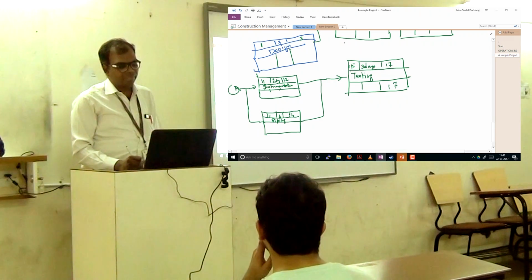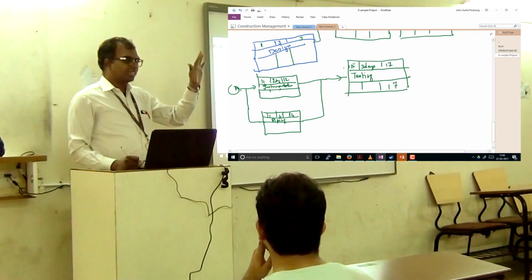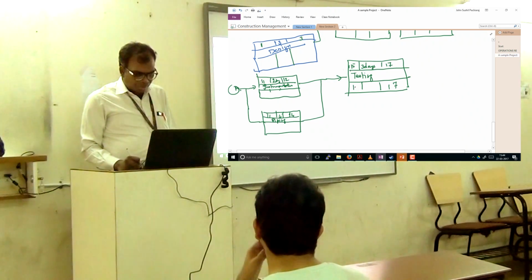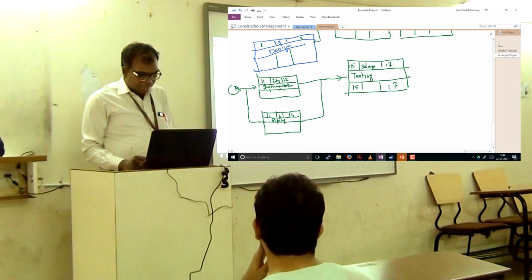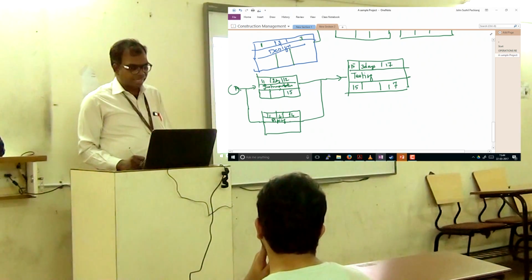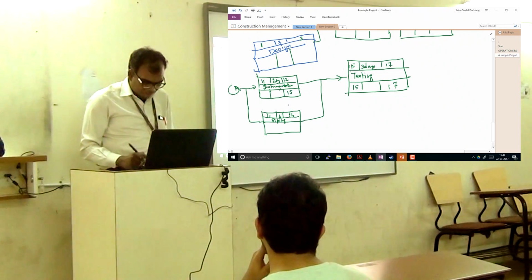Now again we are having 3 days duration. So 17 minus 3: 17, 16, 15. Now when I come here, the latest I can finish this is the 14th day, the day before this, 15.